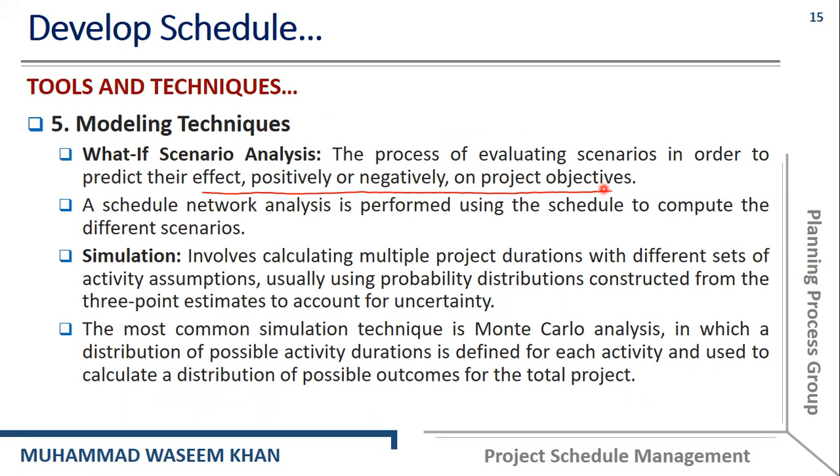The next one is simulation. Simulation involves calculating multiple project durations with different sets of activity assumptions, usually using probability distributions constructed from the three-point estimate to account for uncertainty.